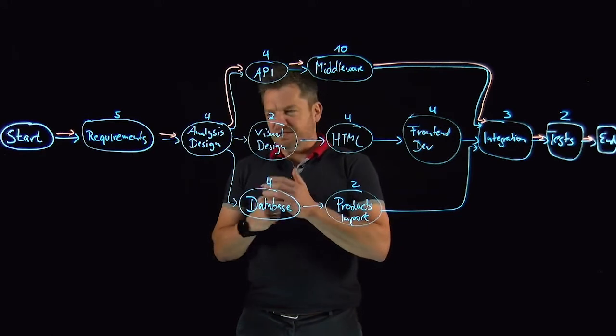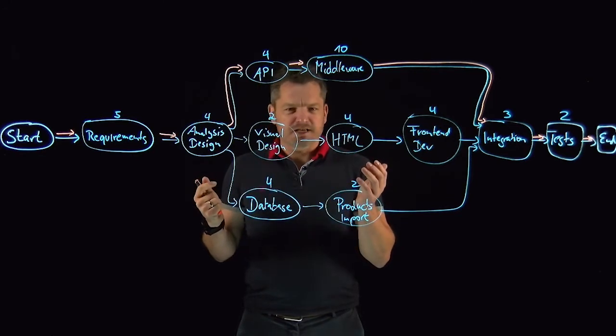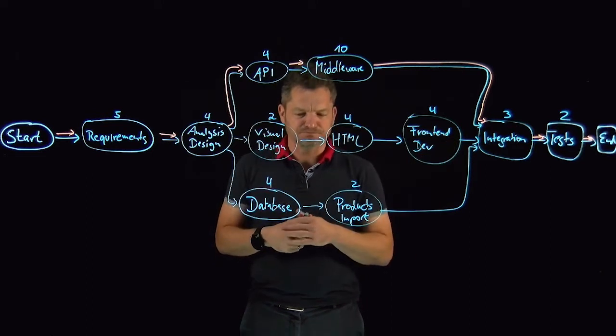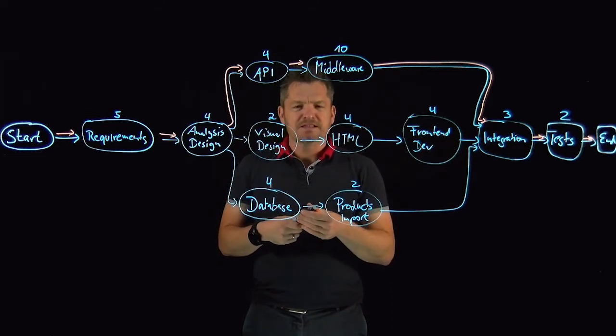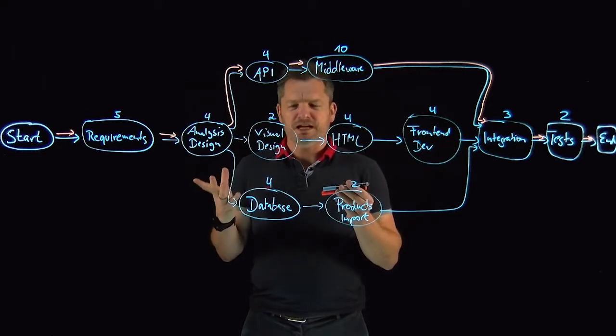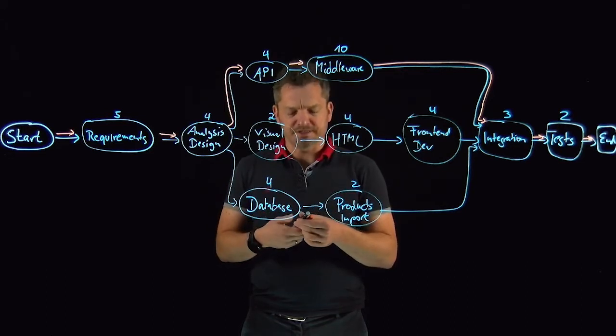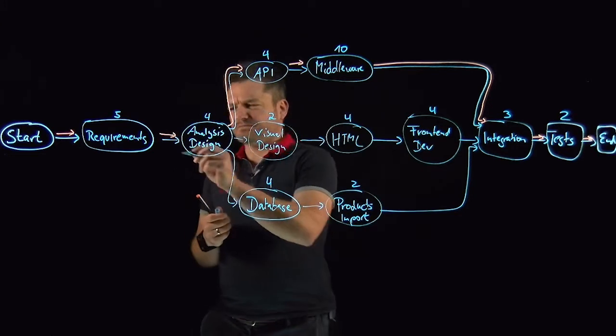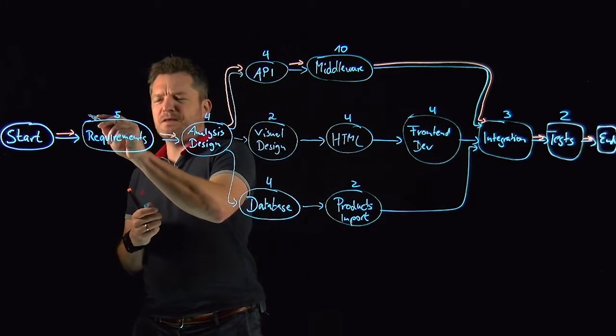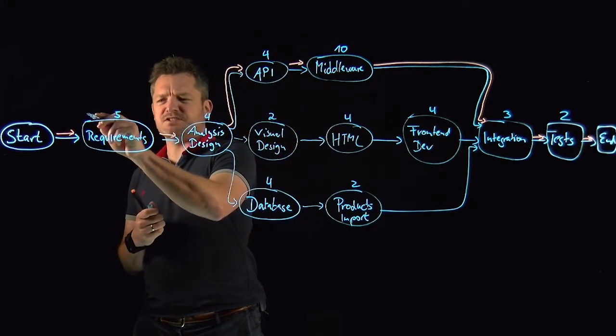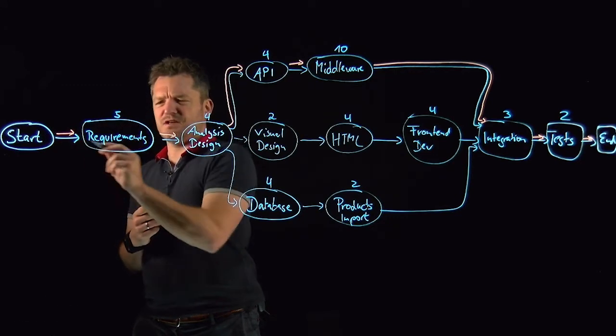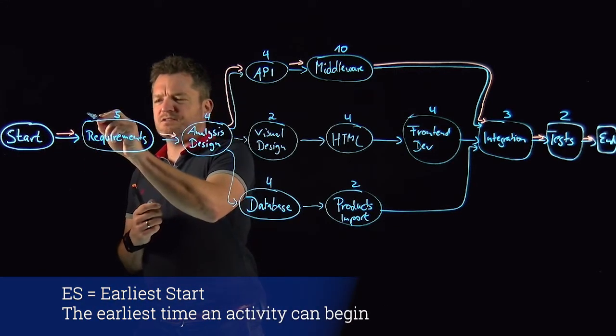And how are you doing this? Of course you move through this network diagram. So let's first of all have a look how you're gonna do that. First of all you write down at the top left the earliest start and the earliest start here for this activity because this is the start of the project is zero.